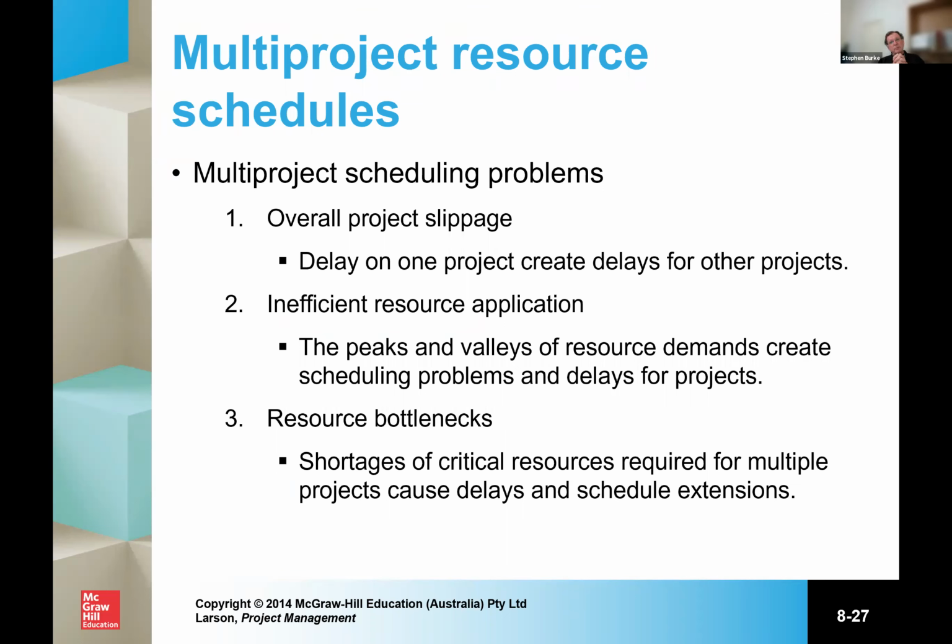Multi-projects, of course, have problems though. You have increased complexity, multiple timelines, multiple communication patterns, and the fact that the projects, as I tried to explain not very well in my previous comment, delay in one project might create delays in other projects, and this can have a snowballing effect or a multiplying effect down the projects.